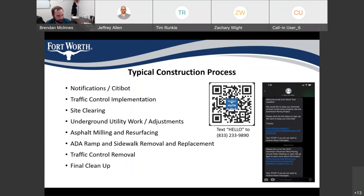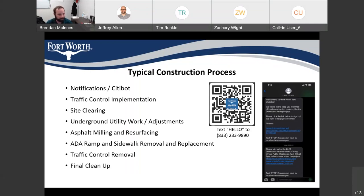The contractor will be doing ADA ramp and sidewalk work concurrently with other work throughout the project once all locations are determined. Once they're done with the street resurfacing, they'll put some temporary pavement markings down in the interim, then come back and do complete restriping of the roadway, putting all the crosswalks and pavement markings back. They'll remove all traffic control and do any final cleanup needed. They'll be working the red areas in three quadrants, and in downtown they'll be moving block by block on the ADA ramp replacements.